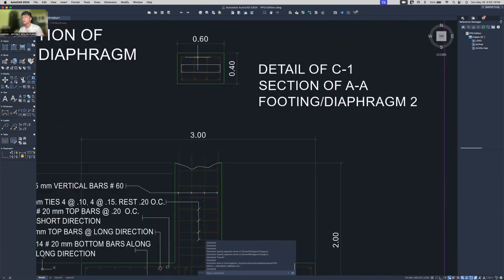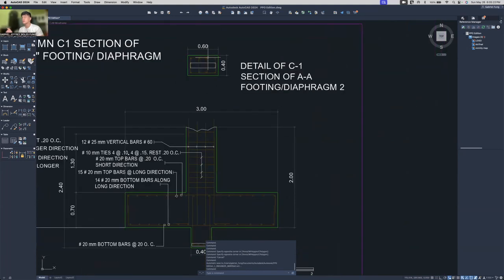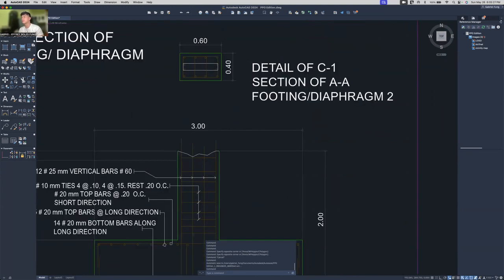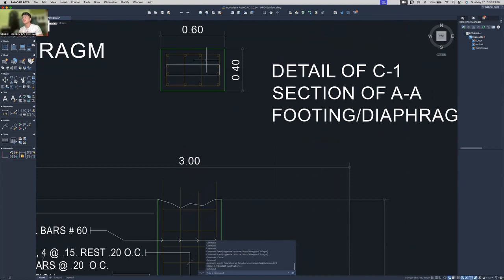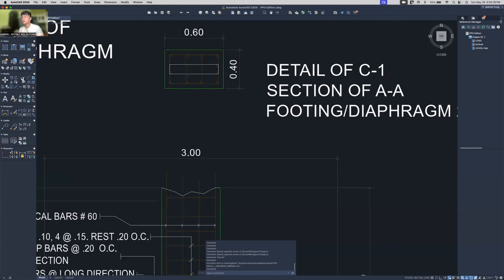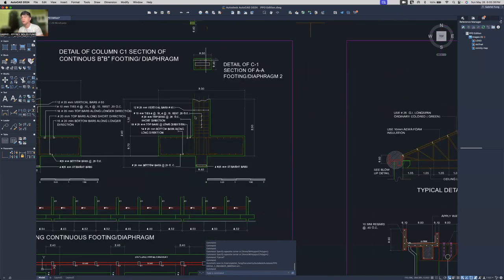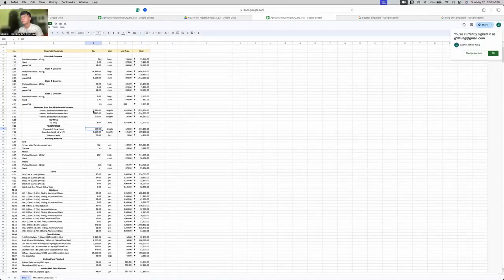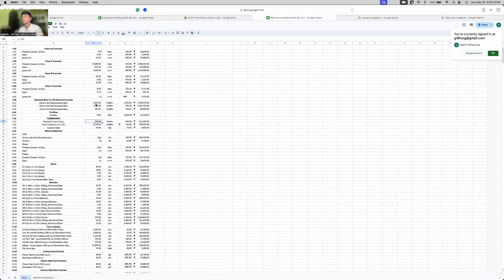After acquiring the total length of the tie, we multiplied it by the number of ties and then divided that by the total length of the 6 meter bars. So the values for the rebars came at 3,551 pieces, 1,460 pieces, and then 505 pieces of 25, 20, and 10 mm bars respectively.